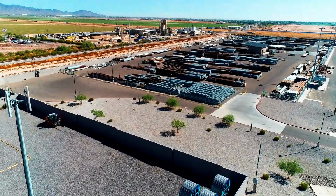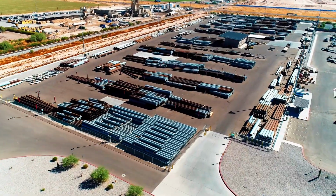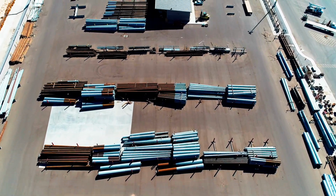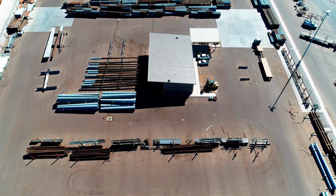The safety culture for this project was really started from the very beginning with the initial scope of works being civil, performed by McCarthy Civil, and concrete work throughout the site. Those expectations and standards were carried throughout the project with the field staff, and McCarthy self-performed mechanical, electrical, and plumbing, performing large scopes of work throughout the project, which resulted in a project of almost 24 months and 350,000 man-hours, having 0 recordables and 0 lost time incidents.